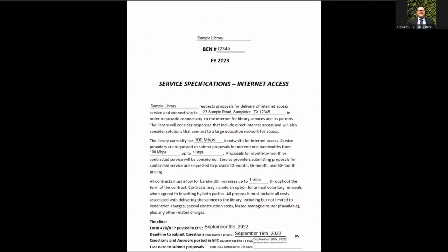Please bear in mind that if one of these days falls on a weekend or on a day when you are not available to either submit those questions and answers or address some of these questions, you may want to consider adding some extra days to the timeline.